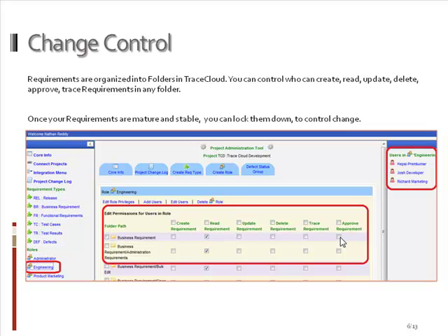And the place where change control comes into the picture is once, say, you shake hands and you agree that you have a date set for features you're releasing, you can lock down the folder to make sure nobody makes any changes after the agreement is done.